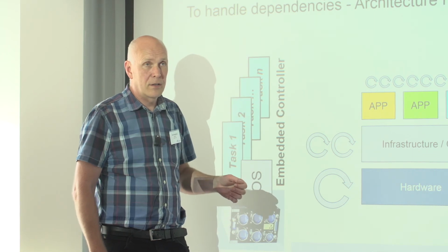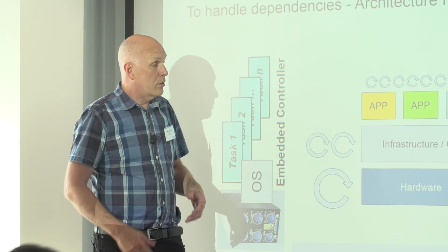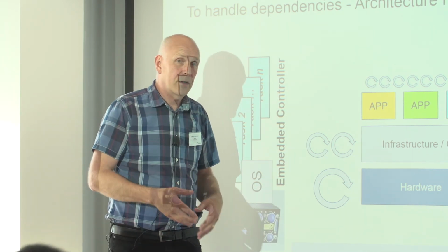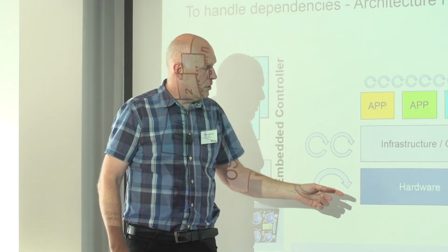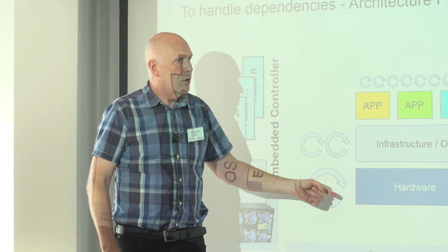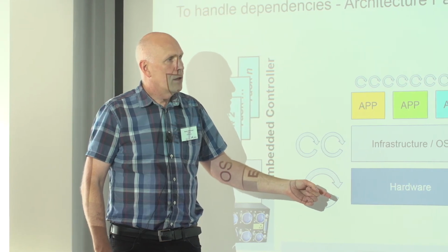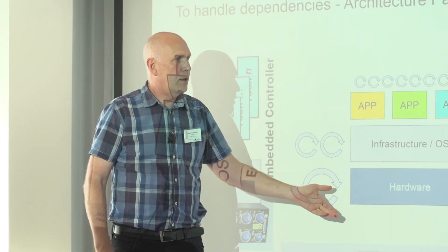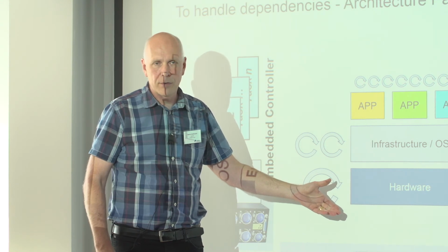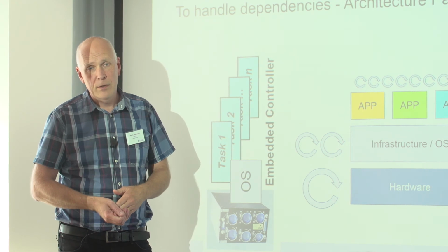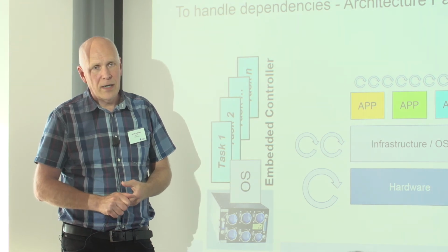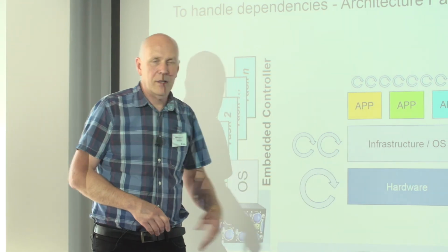There are different skills involved. Documentation requirements are different, and so on. So we have a more agile approach up here, and more waterfall or V-cycle down here, and here we have subcontractors involved also, so it's another aspect of the process as well. The acquisition process is involved here.